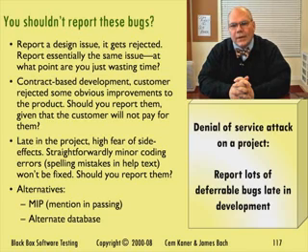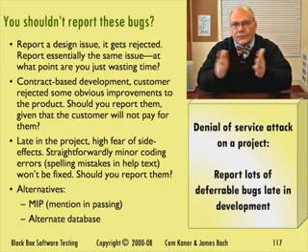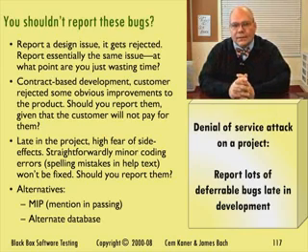Late in the project, minor bugs that won't be fixed can burn a lot of time. How much time? Well, I want you to think about the bug reporting workflow that we looked at for a deferred bug. Think about all the people who spend time with that bug after it's gotten into the database. Ignore the reporting time. At a few companies, I've been involved in trying to build estimates of this time. How many total person hours across all the decision makers is it going to take to defer a bug? 6 to 8 hours for commercial software is probably a reasonable estimate. For regulated software, that number is probably higher.